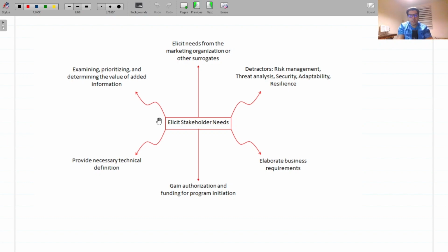These outputs can be captured in lifecycle concept documents, particularly the OpsCon and the StRS, which often are used to support the generation of a statement of work and/or an RFP, both of which are artifacts of the acquisition process.